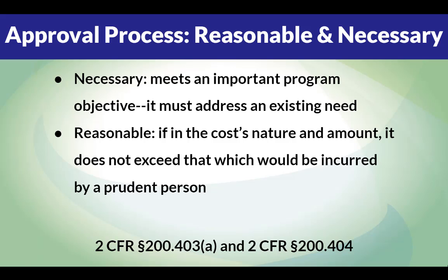A cost is reasonable if, in its nature and amount, it does not exceed that which would be incurred by a prudent person in the absence of federal funds. A cost is necessary if it meets an important program objective, meaning it must address an existing need.